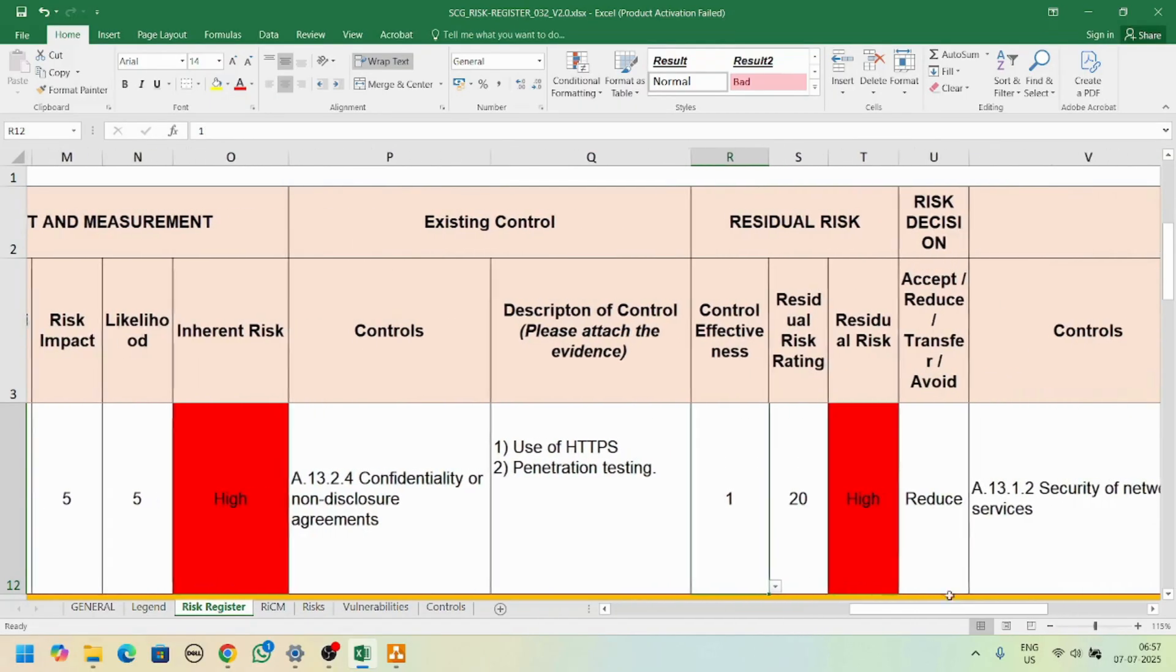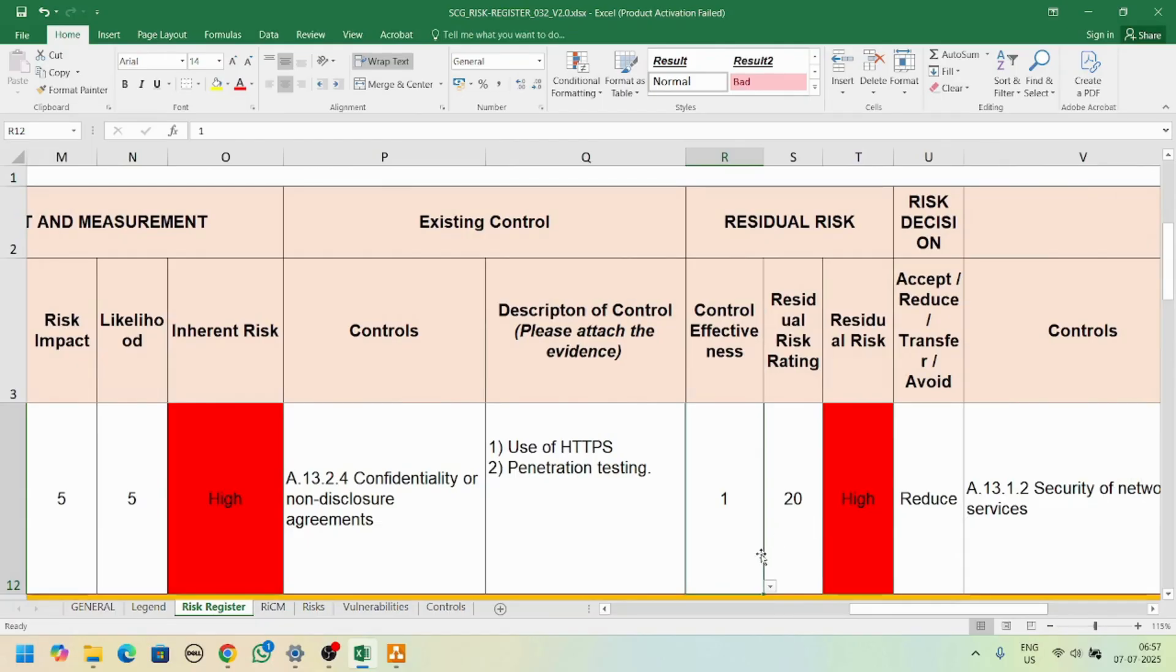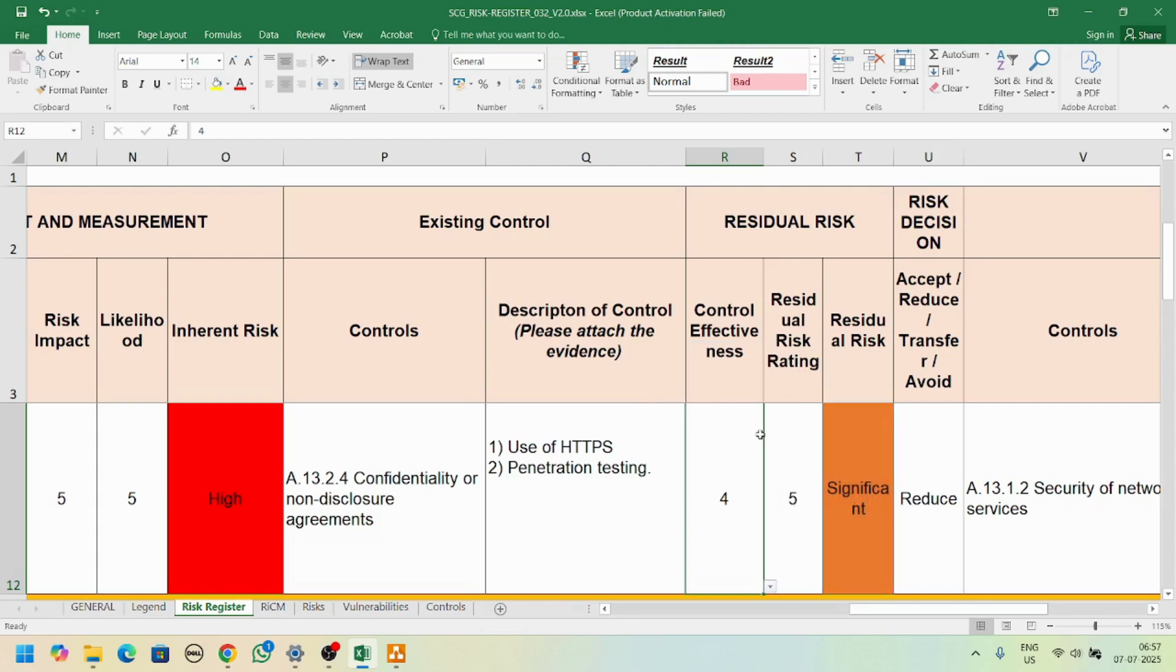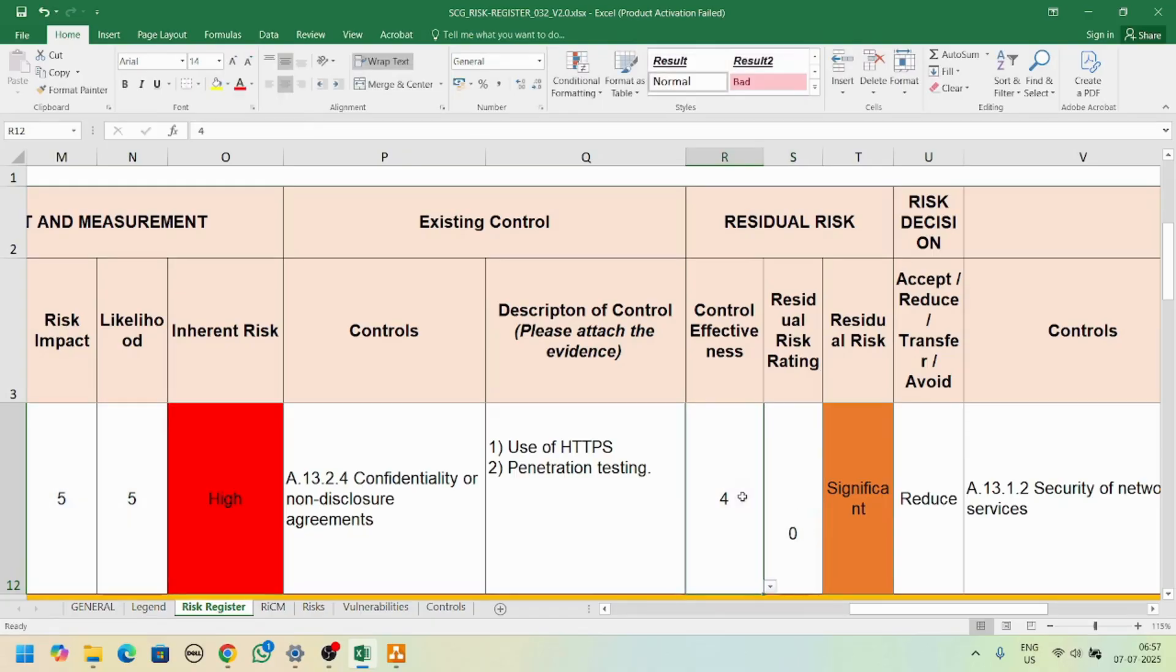Once you apply the control, what is the effectiveness of control? Out of zero to four, you just select the effectiveness. Four means the control is effective. Let's go with residual risk.